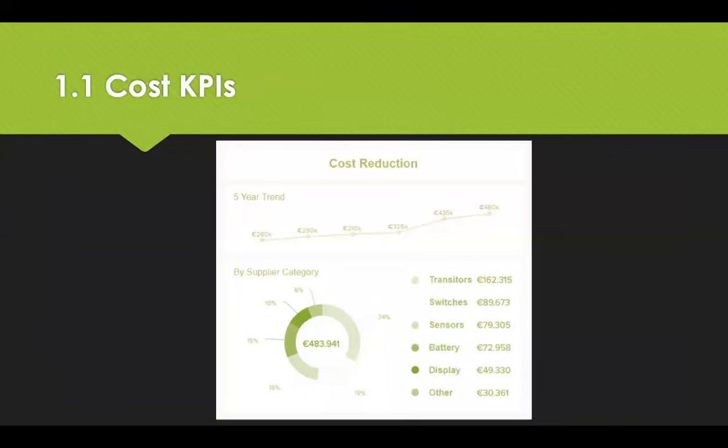Now, price measures can include marketplace competitiveness, discounts and payment terms offered, flexibility, estimated timeliness and accuracy. But a simple cost reduction target looks at the historical cost baseline for a specific good or service and compares it with the current cost impact. The percentage variance gives the savings figure or cost increase percentage.